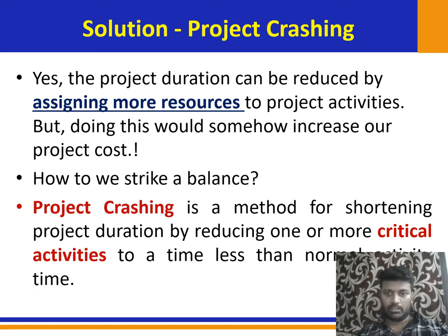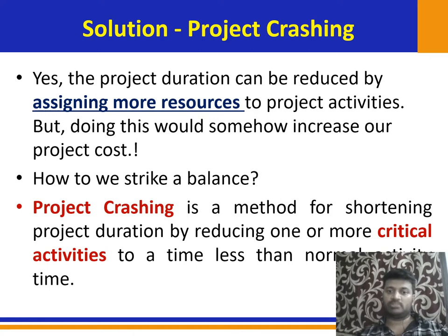Crashing is a method for shortening the project duration by reducing one or more critical activities to a time less than the normal project time. When I say crashing, it means that I'm going to shorten the project duration. When I say project duration, initially you planned it for 3 years, and now after crashing it may be 2.5 years or 2 years or 7 months, something like that. So I'm going to shorten the total duration so that the project can be completed earlier, and we can save a huge amount of cost and time. That is our whole objective here.